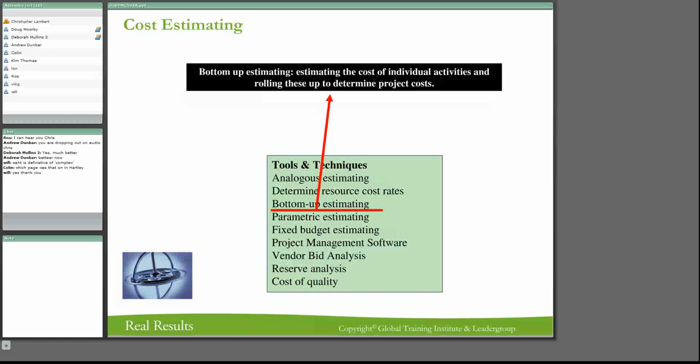The page that I got on those ones is on page 48. Right, now let's look at some of these here. The bottom-up estimating is what you're going to do in your detailed planning, and it really goes down to each activity, and it goes into detail in estimating the cost. All right, so that's where you're going to take your labor costs, and that's why you do your work breakdown structure to such fine detail. It's really for two things: to estimate your time and to estimate your labor. So you need to break it down so that it's easy to do.